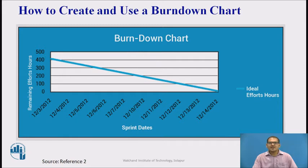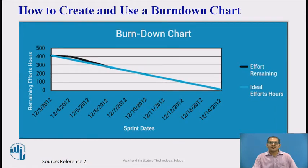As you can see, the total hours for the entire sprint are shown on the Y-axis. The green line shows what the ideal work progress should be during the sprint. If we assume there will be no problems or delays, all the tasks should be finished by the end of the sprint. The green line shows the progress that has been completed while the black line shows the remaining effort needed to complete the project.